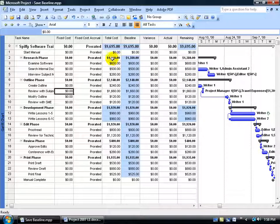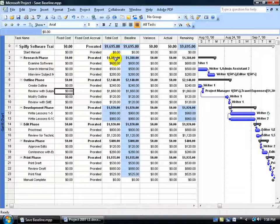You have the summary cost for the phase here or the higher level task. That just means it's grouped and you get the total of all the sub-tasks down below. When you add them all up you get a total of $1,380.